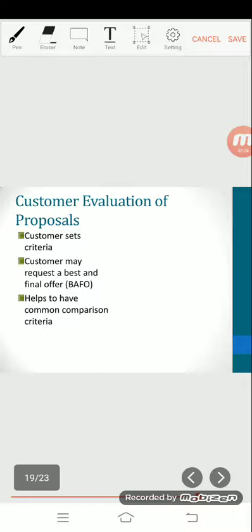However, the customer usually requires the contractor to provide a written rationale for any cost reductions to make sure they are reasonable. Once the customer has selected the winning contractor, the contractor is informed that it is the winner, subject to successful negotiation of a contract.